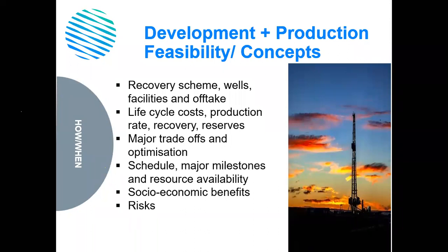You will have your own opportunity situation that you need to demonstrate and present in your business case. So I appreciate that not everyone will be working on developments. If you are, there are essentially three parts to the development process: the concept selection, where you look at lots of different options; the field development plan, where you work up one particular option; and then thirdly and lastly, the implementation of the project.